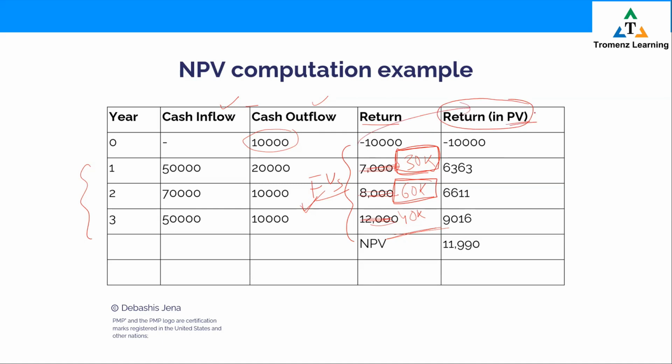Present value means what it is worth as of today. Say you're going to get a sum of money of, say, 30,000 after 3 years. If I ask you, tell me what is this worth today, today's value, present value. It won't be 30,000, it would be somewhat less. Right? Okay. So how do we translate that? We'll use this simple formula. Watch. Present value is equal to future value divided by 1 plus R to the power N.